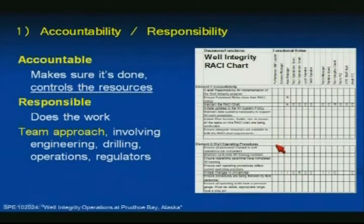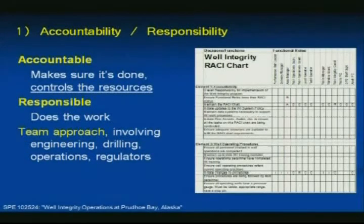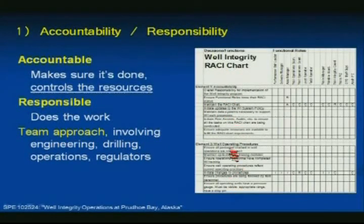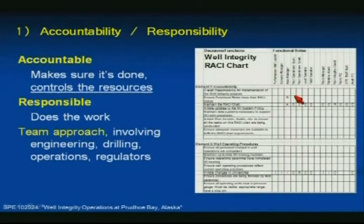Accountability and responsibility: the accountable person makes sure it gets done and, more importantly, they control the resources. What you'll hear from responsible people — the ones who do the work — is that they have a full plate. That accountable person ensures there are enough resources to get things done. There are a lot of tasks associated with managing a well-integrity program. We use RACI charts — Responsible, Accountable, Consulted, Informed — to ensure all tasks are identified and there is clear assignment of who's going to do them. This is very helpful in large organizations, especially where there's a lot of movement of people between teams.